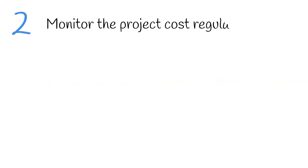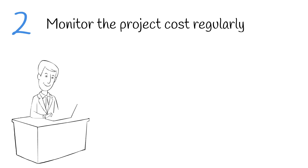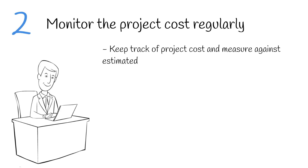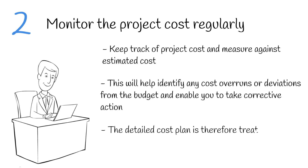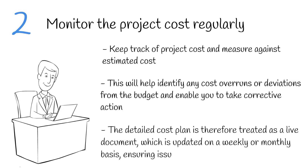The second tip is to monitor the project cost regularly. This ties in closely with tip 1. It's important to keep track of project costs and compare them with the estimated cost regularly. This will help identify any cost overruns or deviations from the budget and enable you to take corrective action. The detailed cost plan is therefore treated as a live document, which is updated on a weekly or monthly basis, ensuring issues are promptly addressed.